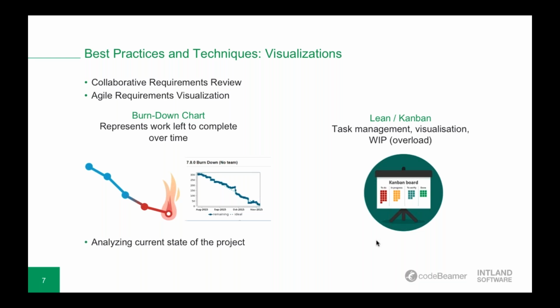Applying this Kanban methodology helps developers visualize and manage the workflow by letting you track and move issues and trigger status changes along the defined and agreed workflow. So usually you have 4 columns: to do, in progress, to verify, and done, and then the workflow statuses of the different items are all mapped to a column.